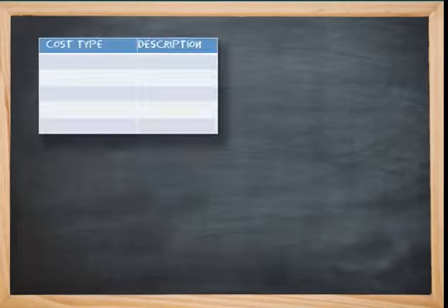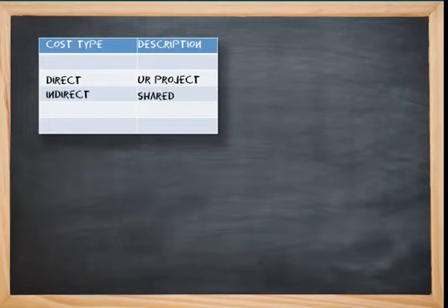There are two types of project cost and two types of cost usage that you should think about. First, the two types of project cost. The first cost type is direct. This is exclusively costs that are associated with your project. An example is customized UI code development. The second cost type is the indirect cost. This is where the costs are shared among projects, and an example is enhancing your server system throughput. It will benefit your project, but probably many others.